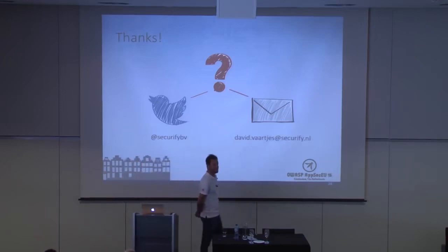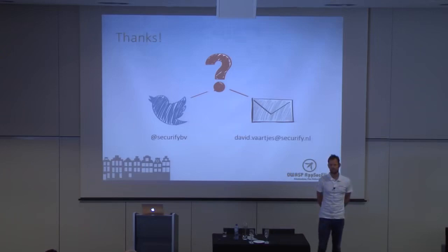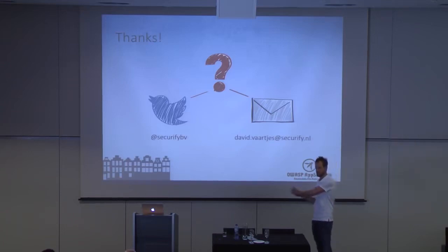Yeah. I think you can do the math on that. We needed 4 to 8 hours per team, and we supported multiple teams together, like 5 or 6 teams, maybe 7. Sometimes teams are really low on what they produce, and other teams are really working hard.